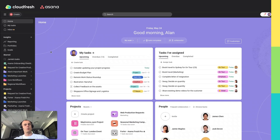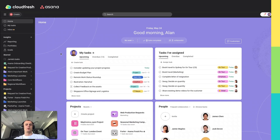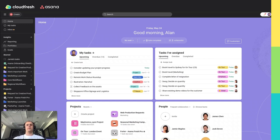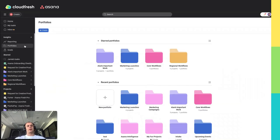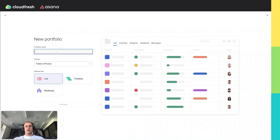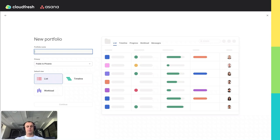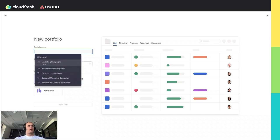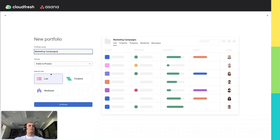Step 1: Initiating a portfolio. First, let's create a portfolio. To do this, navigate to the portfolio section on the left side of your Asana dashboard. Then click the New Portfolio button and choose a name that accurately represents its purpose, such as marketing campaigns or product development. In my case, it will be marketing campaigns.